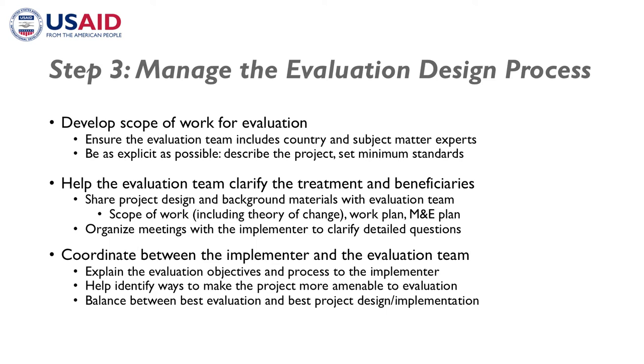Another thing that USAID can help do is identify ways to make the project more amenable to evaluation. So we talked a little bit earlier on about the importance of having a flexible program design and rollout. In the case of the Ethiopia Land Project, it's not possible to test different activities in different communities. We really want to test a package of interventions. But maybe we can roll out that package at different stages in different communities, and then essentially you can compare those communities to each other and have a better sense of what the impact of that package of interventions is.